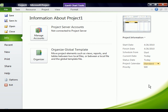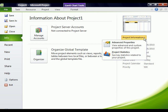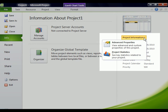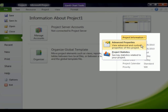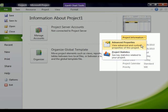The second thing that I like to do after setting a start or finish date is name the project, go into properties and give it a project summary task. This is going to be the bolded task at the top of your project plan that basically gives you an overview of everything. Total duration, total start and finish dates and so forth. In the 2003 and 2007 versions, you would go into the File menu and choose properties. It's basically the same thing now. You're in the File menu and you click on the project information dialog box and then click on advanced properties.